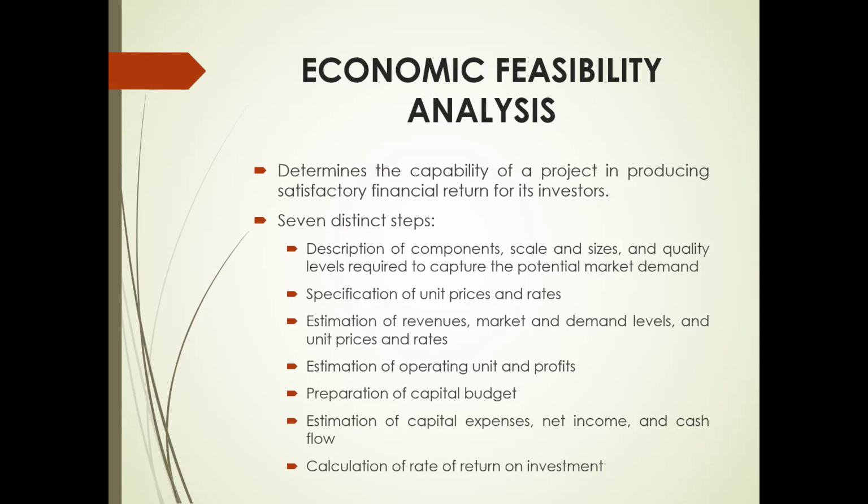The majority of experts favor the time value yardsticks, especially the net present value and internal rate of return techniques. These two methods are based on the present value concept, which implies that money has a time value. Thus, a dollar received today is worth more than a dollar received a year from today, and profits in earlier years are more valuable than those earned in later years. Both the net present value and internal rate of return techniques use cash flow figures as the basis for their projection and discount the value of future cash flows at certain assumed rates of return.